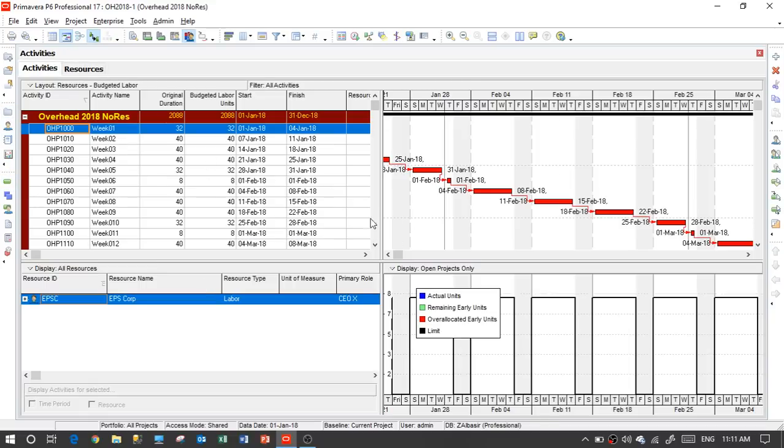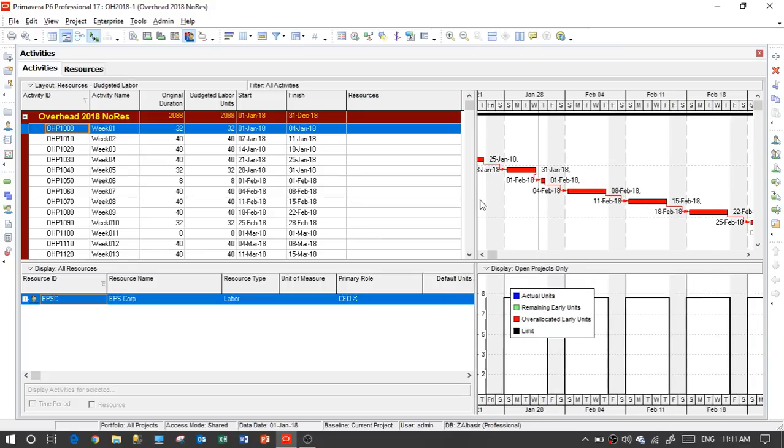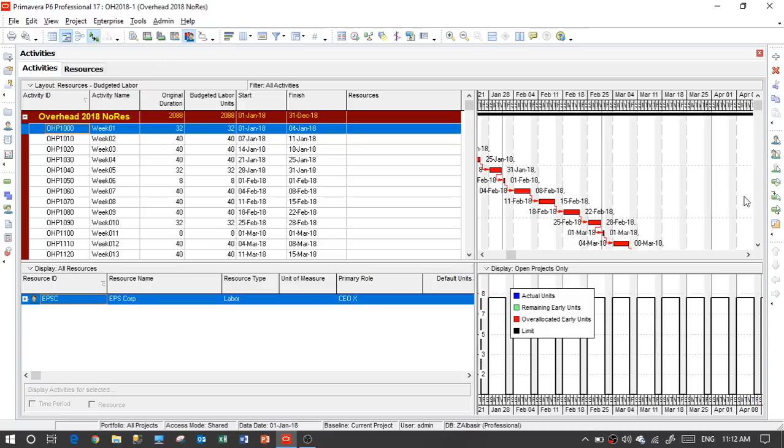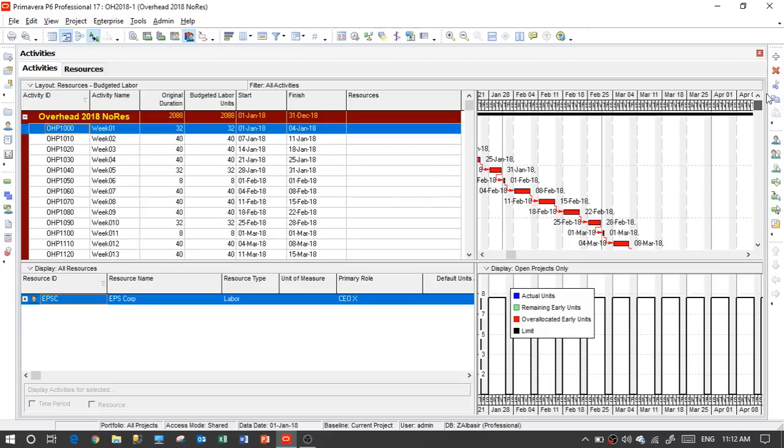Number one, we create the schedule. In the previous training video, please review how to plan the overhead schedule. We create a full schedule for the full year, and we put it by hours for the full week. So every week has 40 hours. And because of the reporting, as explained in the other video, please refer to it. I don't want to repeat the same things.